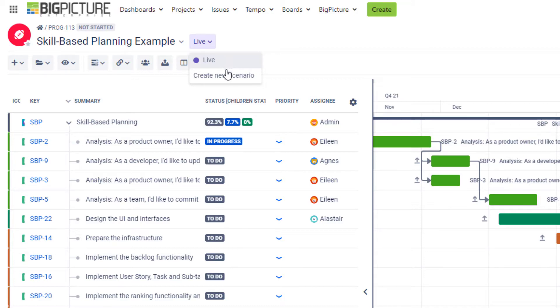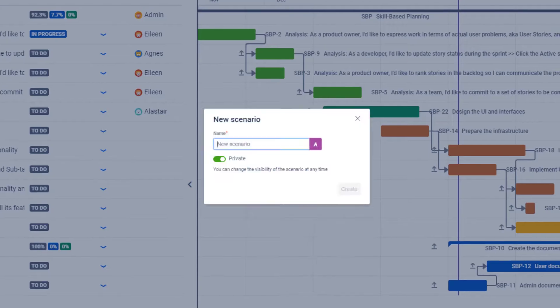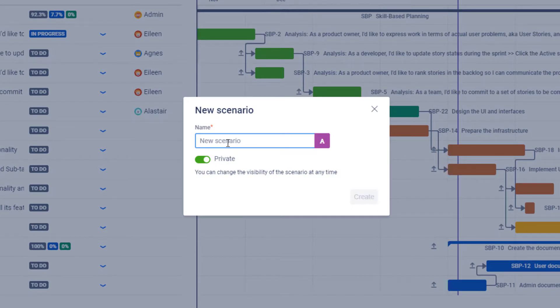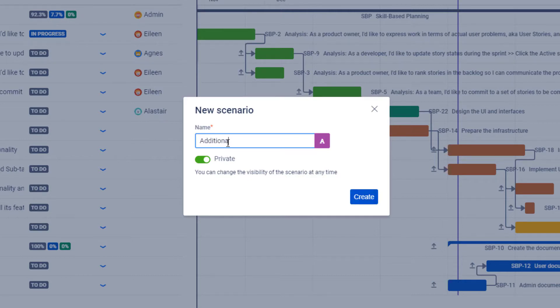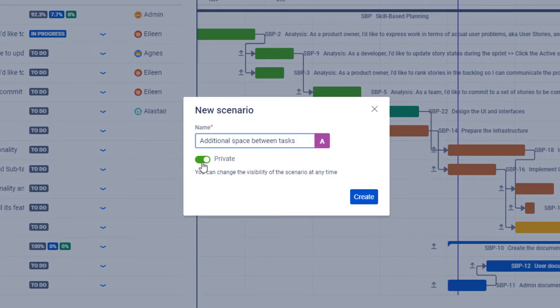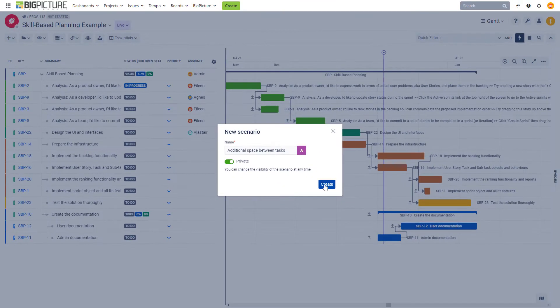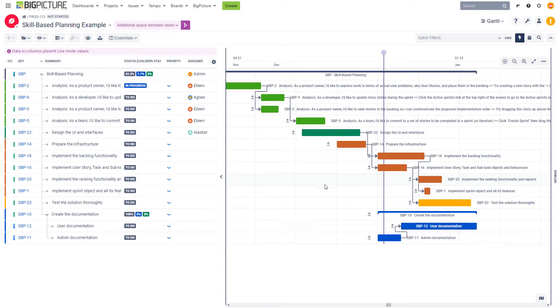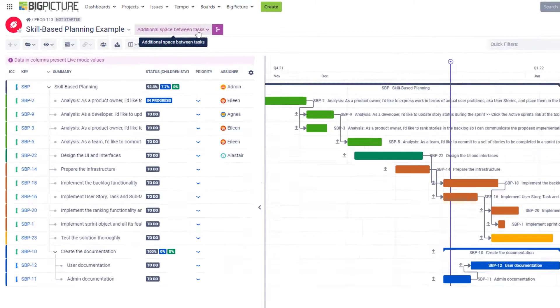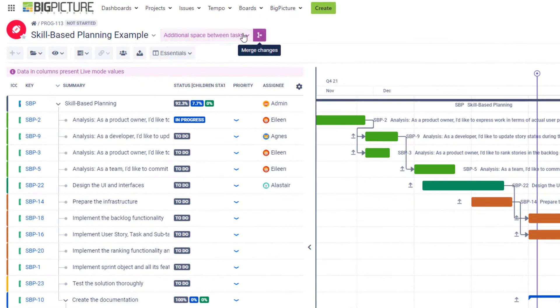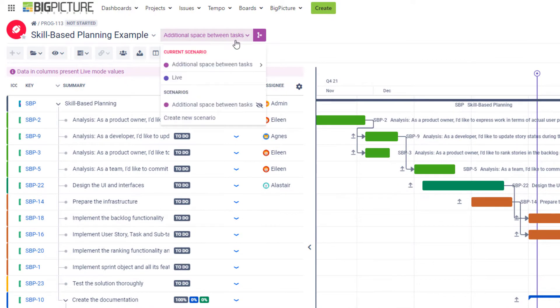So we're going to create one. You hit the create new scenario button over here and you're able to provide the name of your scenario. Let's say that our new scenario will be named 'additional space between tasks' and we'll make the scenario private or public. Doesn't really matter too much because we're the only ones that will be viewing it. Immediately after you create a scenario, it's going to get created over here and selected.